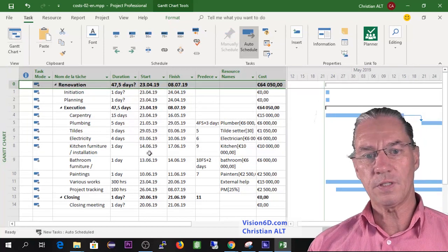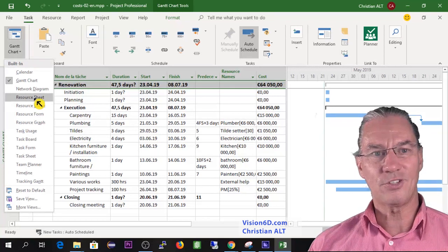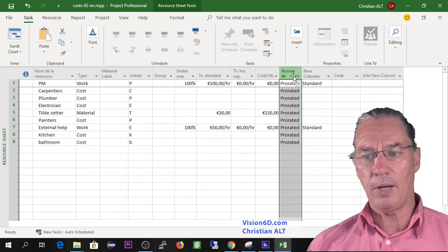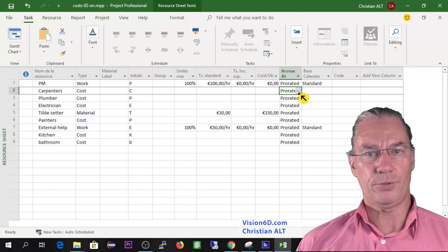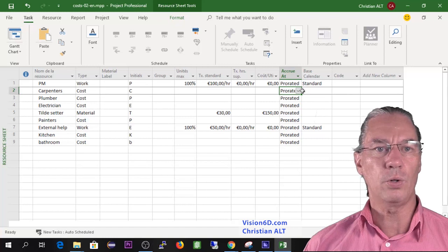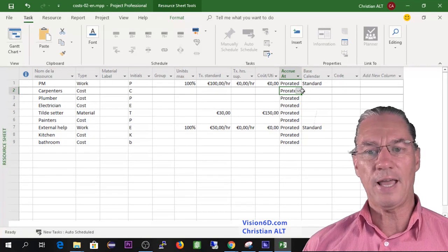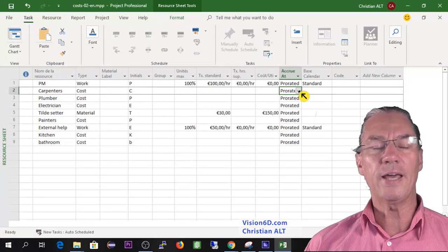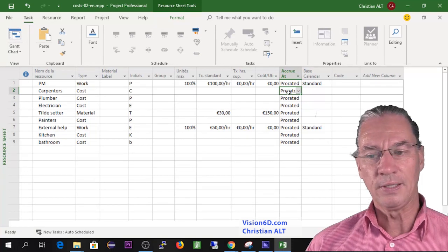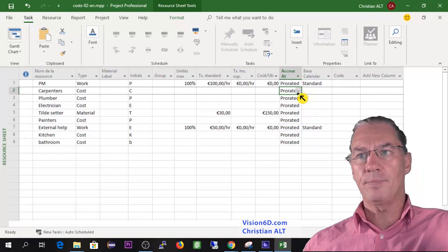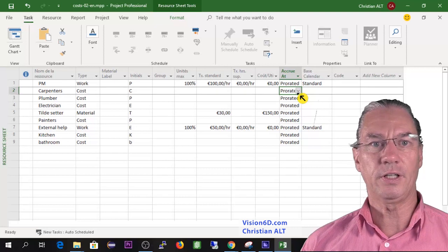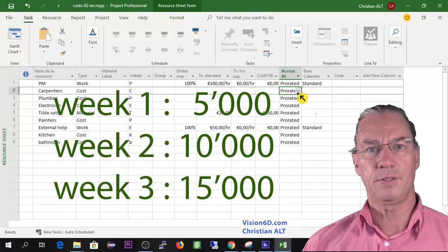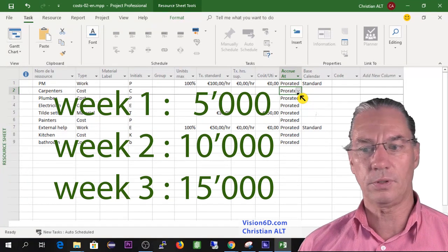One thing is left to me: to go back to the resource sheet and to tell you what to think about accrual. For example, if I take the carpenters, we know that their cost is 15,000. If it's prorated, we know also that they are going to work for three weeks, so 15,000 divided by three is going to make 5,000. It's the calculation that Microsoft MS Project does when calculating prorating. As time passes, costs are calculated accordingly to the time. The first week 5,000, the second week an additional 5,000, so in all it's a 10,000 cost.